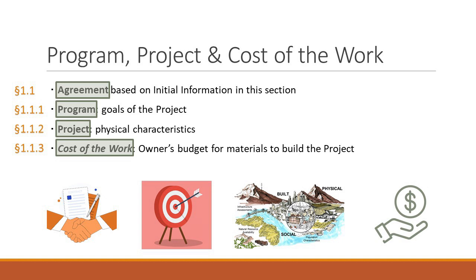So when an owner comes to you and wants to retain you to design that $1 million house, the first question you want to ask is, what's your budget? They say, my budget is $1 million. The second question is, is my fee included in that $1 million? Because owners don't understand this, and again, this gets into your concept of what's important for defined and not defined in the terms.